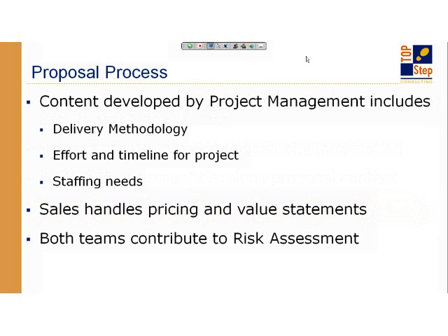So in the proposal process, project management can contribute to the proposal by identifying the delivery methodology, identifying the effort, scoping the effort, the timeline for the project, and the kind of resources that are needed, which of course may directly relate to the pricing of the engagement. So project management scopes the project, looks at it from a timing, a delivery approach using their methodologies. And sales, of course, is going to be the one that handles the value statements of why this is best for the customer, the benefit and value add parts of the proposal, and probably the pricing as well, working with, of course, the finance team and negotiating with the customer.